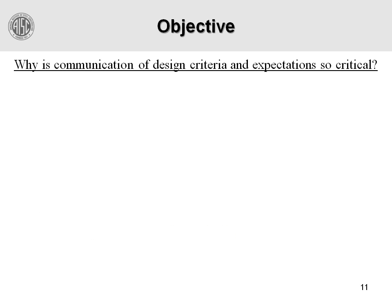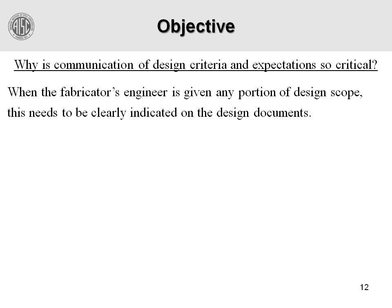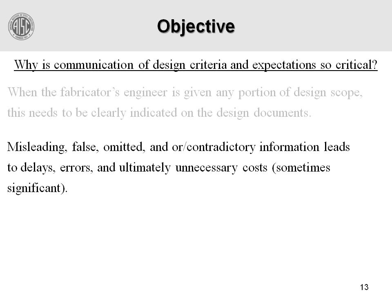Before we get started, I'm going to ask a couple of questions to illuminate why this presentation is important. The first question: why is communication of the design criteria and the EOR's expectations so critical? When the fabricator's engineer is given any portion of the design scope, that needs to be clearly indicated on the design drawing. Misleading, false, omitted, or even contradictory information leads to delays, errors, and ultimately can cause unnecessary costs — and in some cases those costs can be significant.